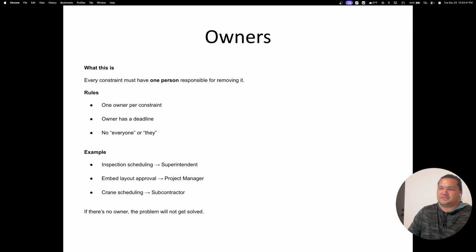Your subcontractor. So you need to take ownership of these specific items and make sure you can oversee that it is being handled. The framing contractor needs to get their own crane scheduled because you don't want to be over that. They have their own flows and when to get it done. You just want to make sure they are hitting their schedule.